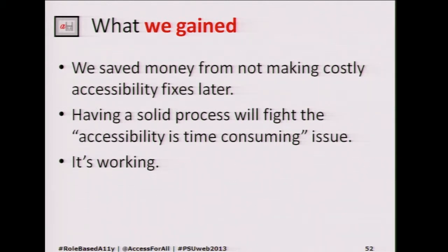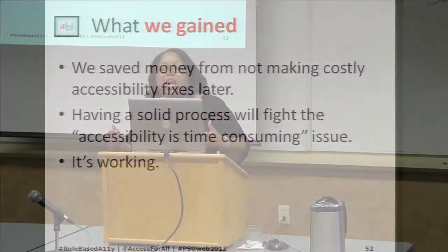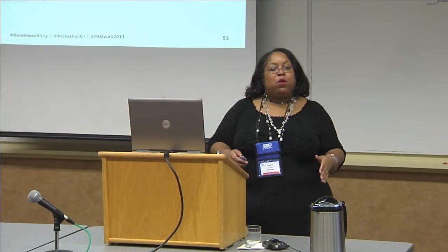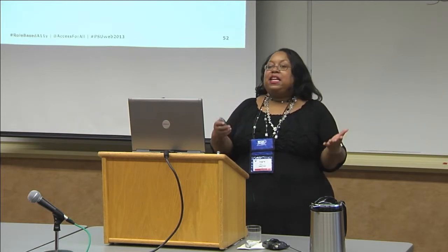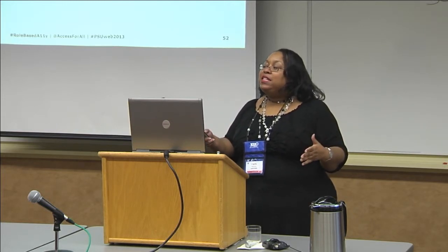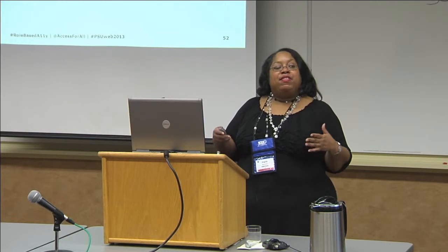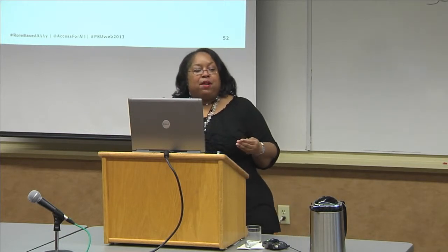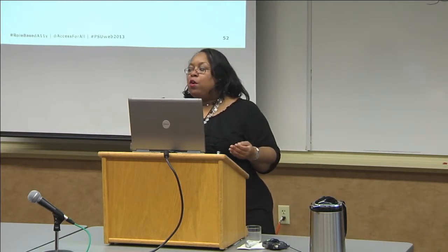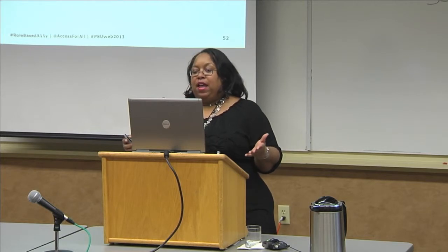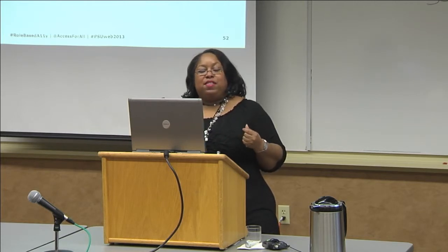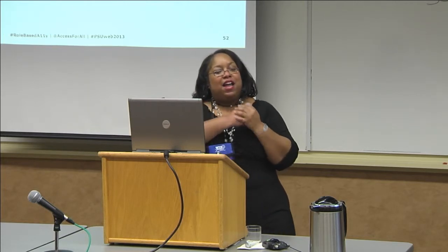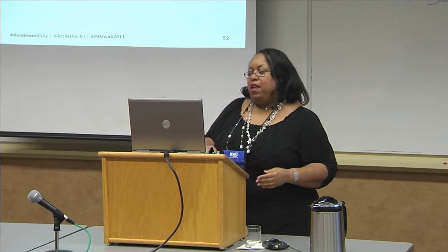We knew then if we were going to be working with a vendor from the outside that we weren't going to be working with a technology that they were unwilling to make accessible, that they were not willing to give up some of the control over their proprietary works. They had to be willing to work with us. So we saved a lot of money by not waiting until the last minute.